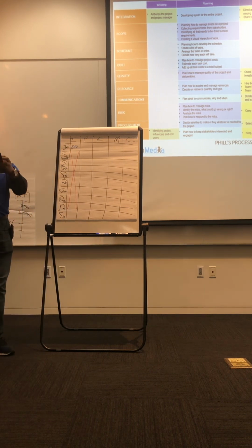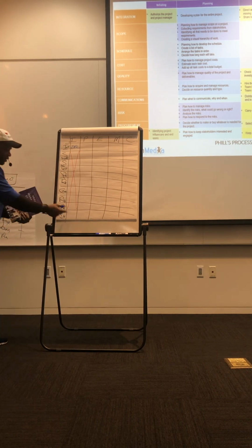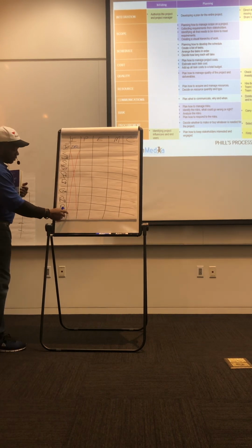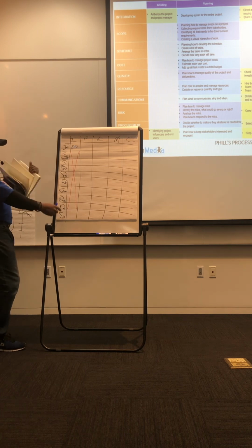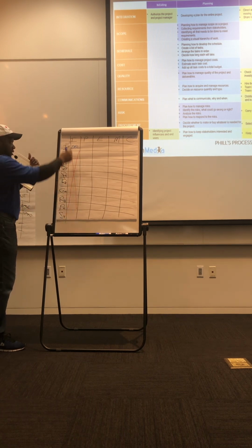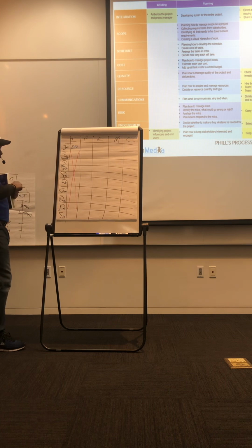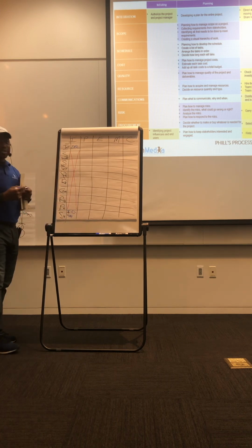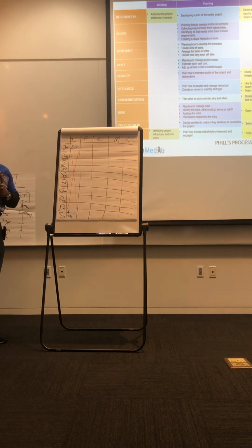And in your purple book, what does it say that process is right down here? What's the full thing? What does it say? Project stakeholders. So this is stakeholders, but what do you have in this box? Identify stakeholders. There you go. I'm being very intentional about the identify stakeholders. And this is where you create a stakeholder register. Doesn't that make sense? You're in the beginning of the project, you should develop the project charter, and you should identify stakeholders. It's just common sense.